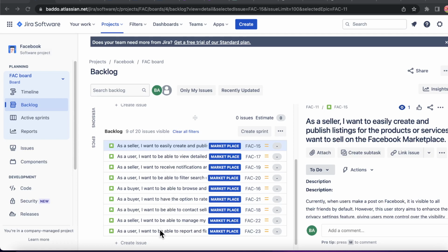Sometimes a particular user story is more required according to the release that they have done so far for the customers. It also depends on project goals. Other times too, it depends on some technical advice. That is, it depends on dependencies. And also sometimes it depends on the urgency.